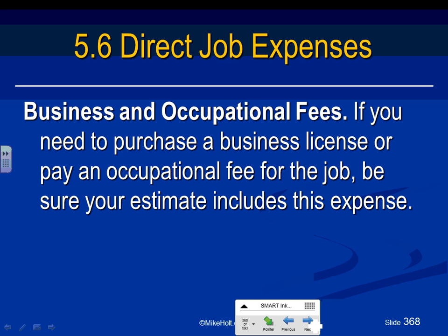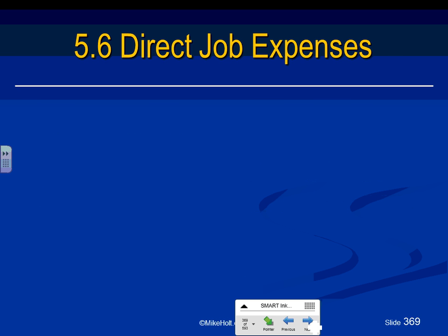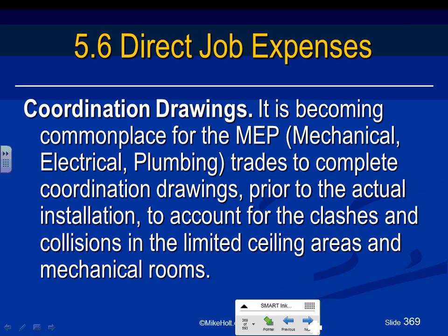Business and occupational fees. If you need a business license or have to pay an occupational fee, you have to accommodate for that, to do that particular job in a different state, for example. Coordination drawings. Some projects like hospitals require you to have BIM or Revit MEP coordination, guys. You're going to get into major projects. So who's going to be doing that?